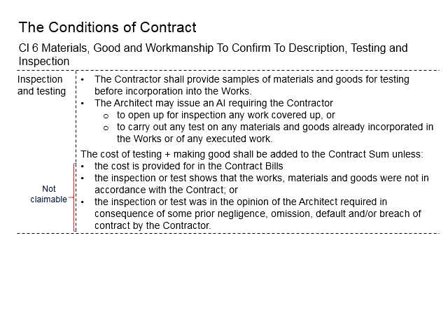It will be dependent on whether the contractor is supplying the materials meeting the standards of the contract document. If the contractor is supplying the materials up to the standard, the workmanship is also okay, meeting the requirement, now the cost of the testing and cost of making good as a result of the inspections and testing will be claimable as added to the contract sum. That means the contractor is doing nothing wrong, meeting the requirement, and the contractor has valid reason to claim for this additional work and the cost.